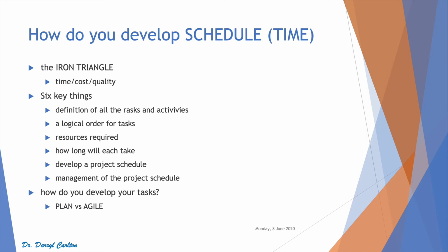So how do you develop those tasks? Are they planned versus agile? Will resource availability affect those? Yeah, it does. If you're running a movie, you will shoot your scenes out of order because they'll be shot around the resources available. So you might have set up a particular set, and you've got shots at that set at both the beginning and the end of the movie. So you will shoot the beginning and shoot the end at the same time because you're shooting it around a built set, a resource that is required.